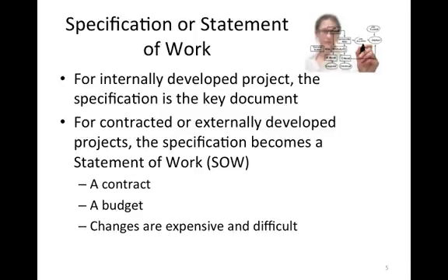So if mistakes are found, or if we did not do a good enough job in our specifications, we find new requirements, at every step of the process, as time goes on, those changes become much more expensive and much more difficult to incorporate into the process. So we want to make sure that, especially if we're going to an external company, we are really clear and really sure of our specifications.